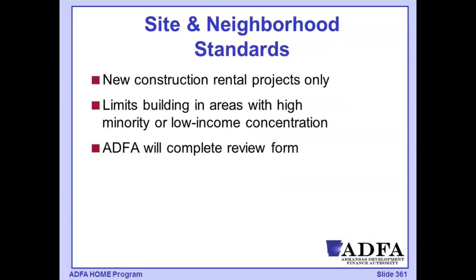And then I want to mention site and neighborhood standards. This is a HOME requirement that applies when we have new construction of rental. So it doesn't apply when we're doing rehabilitation, and it doesn't apply when we're doing new construction of homebuyer units. It's only for new construction of rental projects.